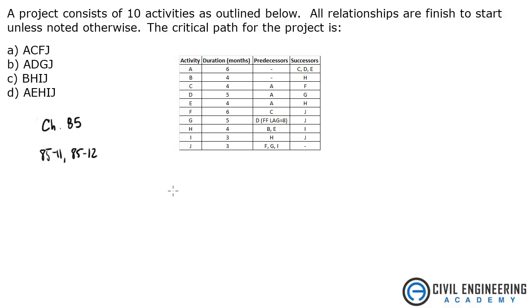So the first thing I'm going to do is change this to an activity on node network, just kind of makes more sense to me. So here's activity A. It has no predecessors. Activity B also has no predecessors. So I'm going to draw that in.